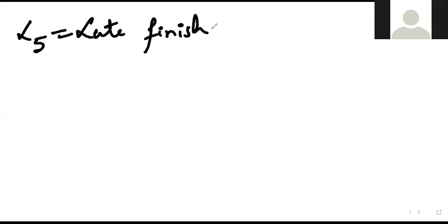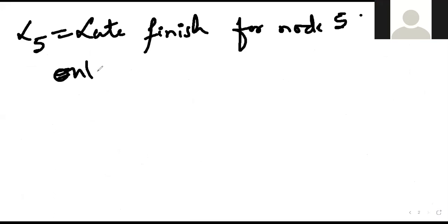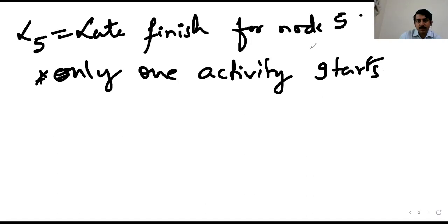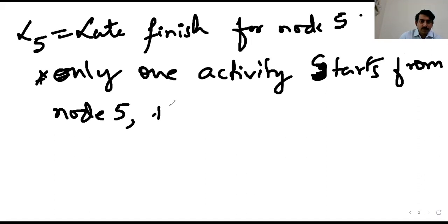L6 minus the duration of 5-6. Only one activity starts from node 5, that is activity 5-6.